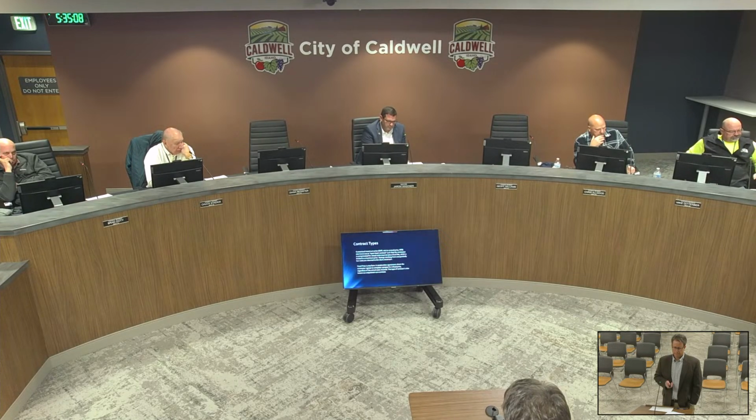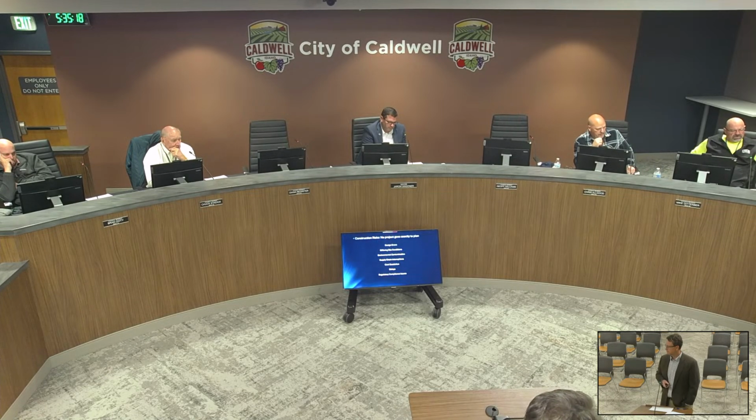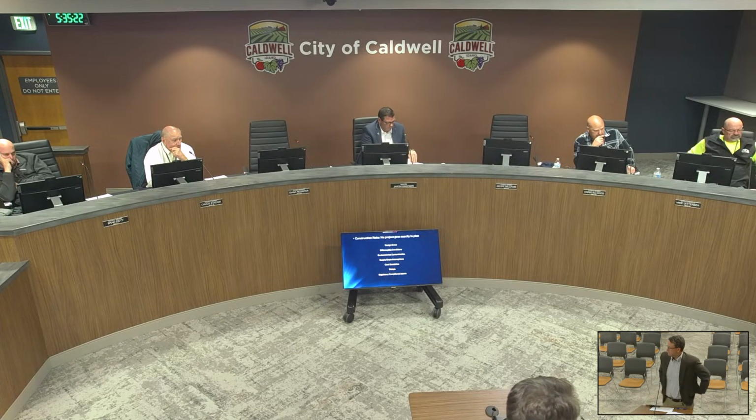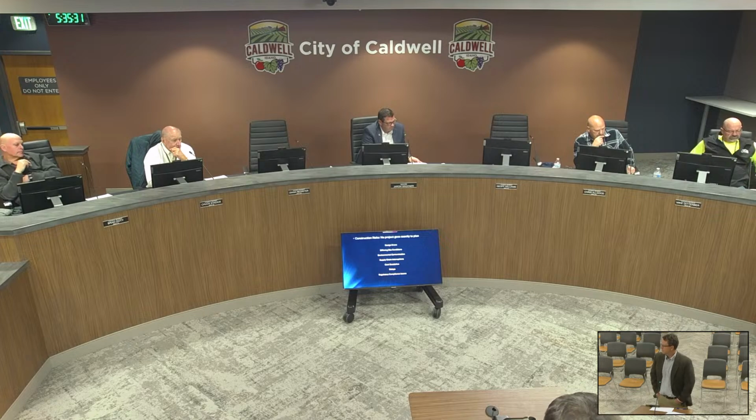But I think it's also making sure that when we project budget and go for the initial budget, we work with Public Works to make sure that we accurately budget as well. I think prices have been changing consistently. We heard a couple of weeks ago that in the last 5 years prices have gone up 20%, and I think that's part of why you see an increase in change orders right now as well.